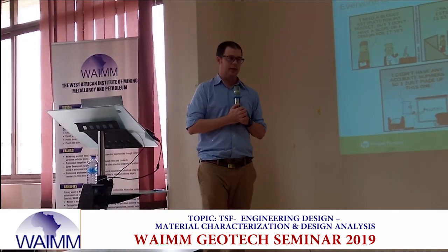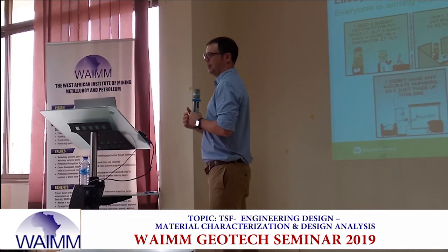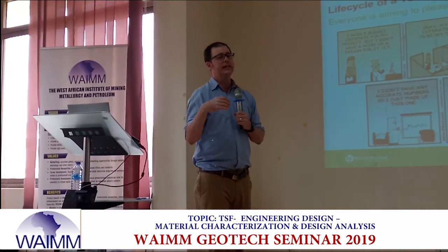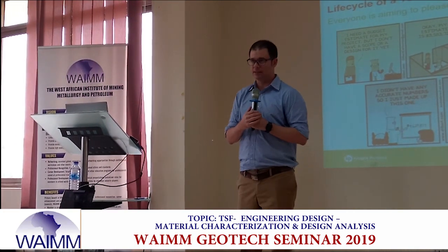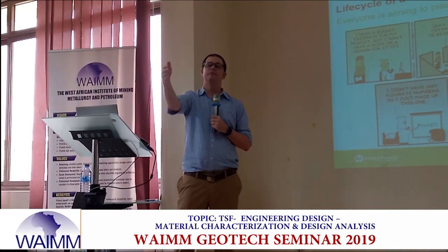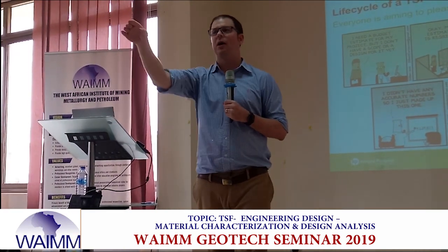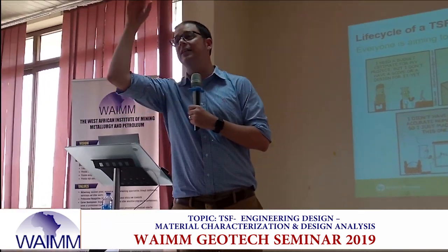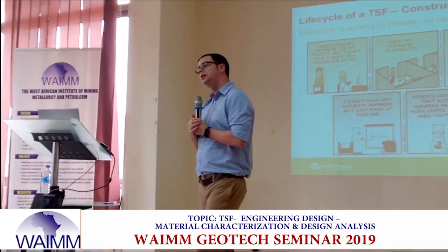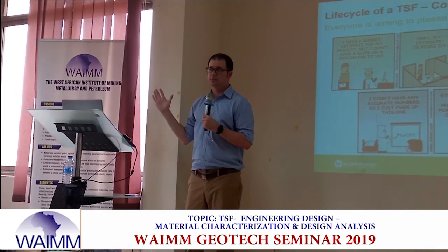Everyone is aiming to please when it comes to construction. All right? Everybody wants to be the guy that saves the money. Everybody wants to be the guy that has the genius idea, and that's great. But we need to be careful of false optimism and compounding optimism. If I'm trying to save you 10%, and you promise to save that guy 10%, and he's promised to save that guy 10%, and then finally it gets to the GM who's expecting 50% savings, all of that really drives our costs on paper down and makes our budgets kind of useless.